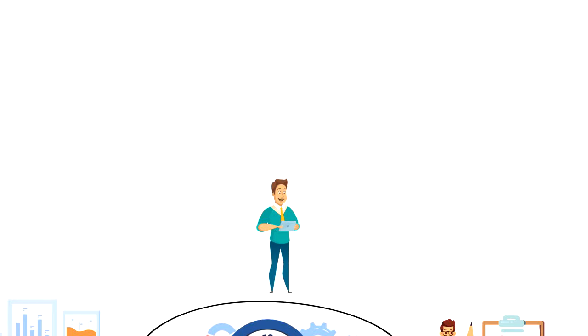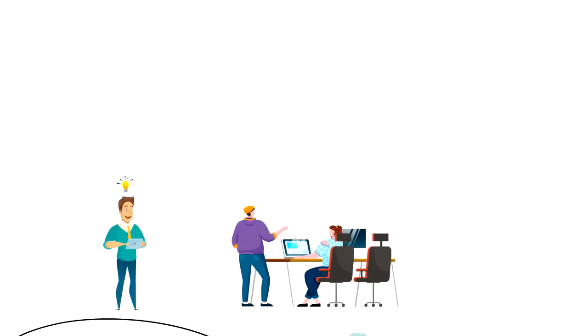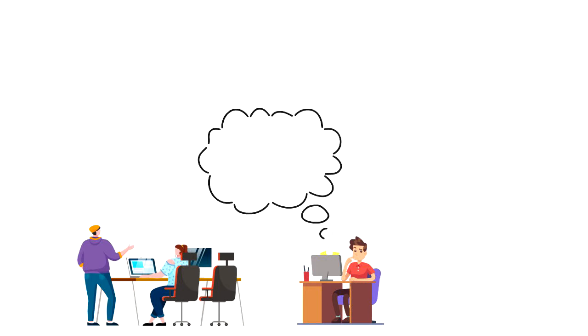Rolling wave planning is great for mobile games, where you experiment a lot. You might plan to introduce a new gameplay mechanic. Then you test the new mechanic, and based on that, you decide what to do next. You might conclude that the new mechanic is not as good as planned, so you want to keep working on it. Or you might conclude that it's great, and therefore you can start to introduce enemies to make the gameplay more fun.